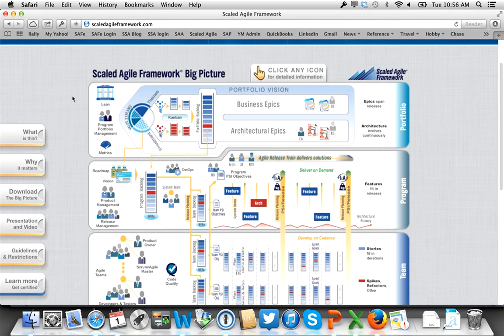And the WIP limits, so the portfolio Kanban system was invented at a company called F-Secure in Finland, who I was coaching through Agile, a really, really good company, really an Agile company and Agile architects, but who had made a series of plans based upon the CTO's view of what could be accomplished and committed to those plans to the outside world. And when we brought those plans in and started vetting them with the teams and realized that the teams had essentially no capacity for new work because they were being eaten alive in the marketplace at the time, we looked at those plans.